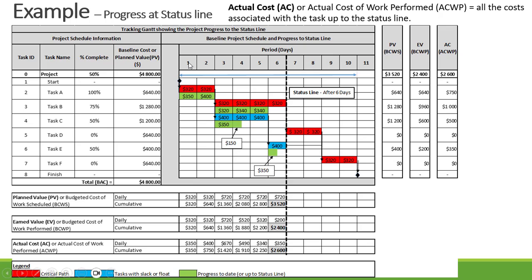Looking at cumulative actual cost: day 1 = $350, day 2 = $400, day 3 = $670, day 4 = $490, day 5 = $340, day 6 = $350 — cumulatively adding up to $2,600.